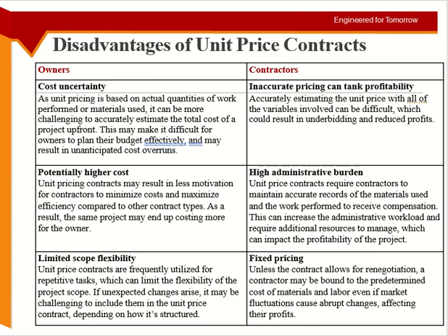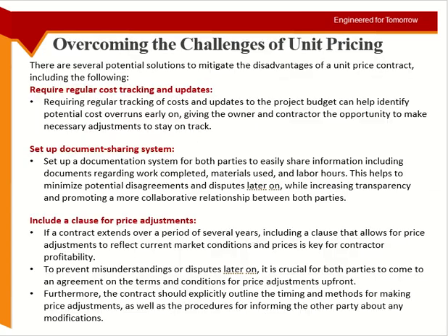Okay, so these types of contracts are done where you feel that, or where the client wants that, okay, the scope can change but the rate should not change. And the lump sum is the other way around. Okay, the scope cannot change.